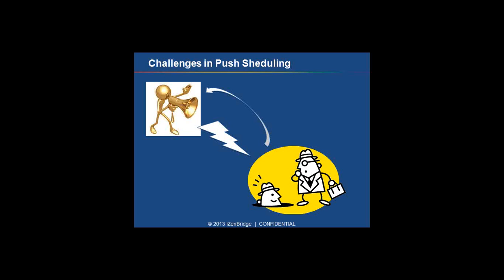Now, for example, in the previous critical path, I was showing that the testing will happen once I am done with the development of feature 1 and feature 2. There may be a case that feature 2 is facing some issue or some details are not available, and these two things cannot be tested together. Now your workforce will remain confused until you, as a project manager, give them the modified instruction. So in push-based scheduling, whenever the workforce faces uncertainty, they look towards a manager to provide modified instructions.